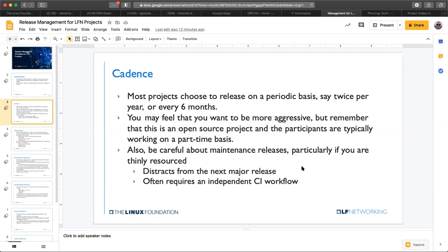And so as a good release manager, I waved my arms and warned them that they could get distracted from working on the Guilin release, which had a compressed schedule anyway, by working on these maintenance releases. And they assured me that wouldn't be a problem. Well, of course, as anticipated, they got bogged down in the maintenance releases, and that caused several delays in Guilin and pushed out the schedule. Eventually they conceded that the maintenance releases had in fact impacted the main release. So my message there is, when you're thinking about releases, think long and hard before you commit yourself to a maintenance release, because they often end up being more difficult than you plan.